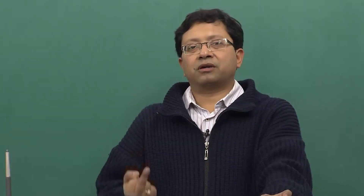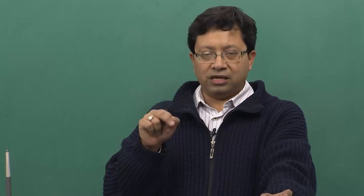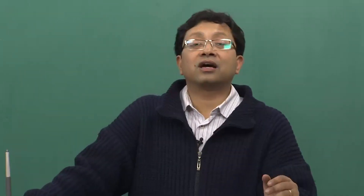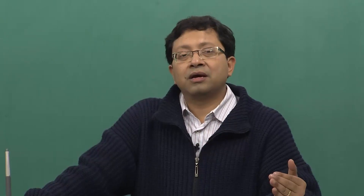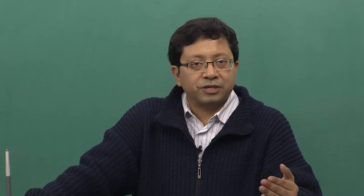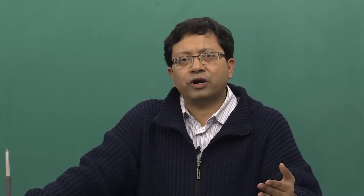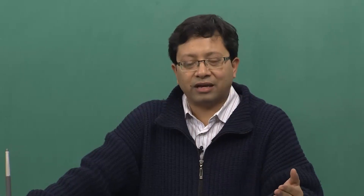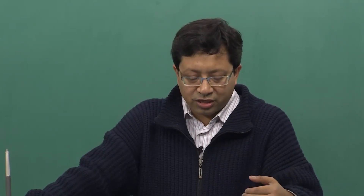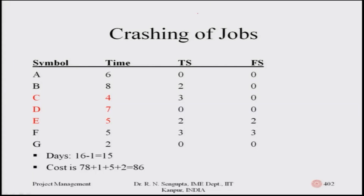When crashing C, D, and E together, you must verify that other activities in the sequence continue to be critical and do not violate precedence constraints or other assumptions underlying the project management approach. This underlying assumption was not explicitly mentioned during the thirty-first class discussion, but it is the actual basis for the crashing decisions.